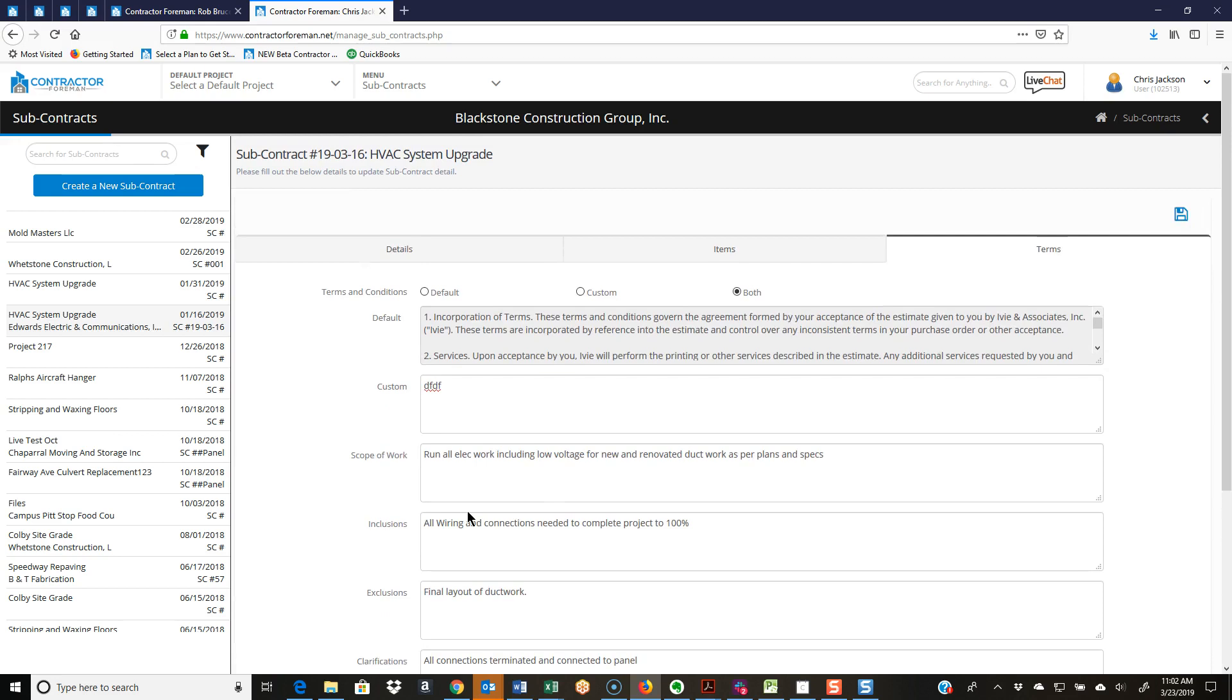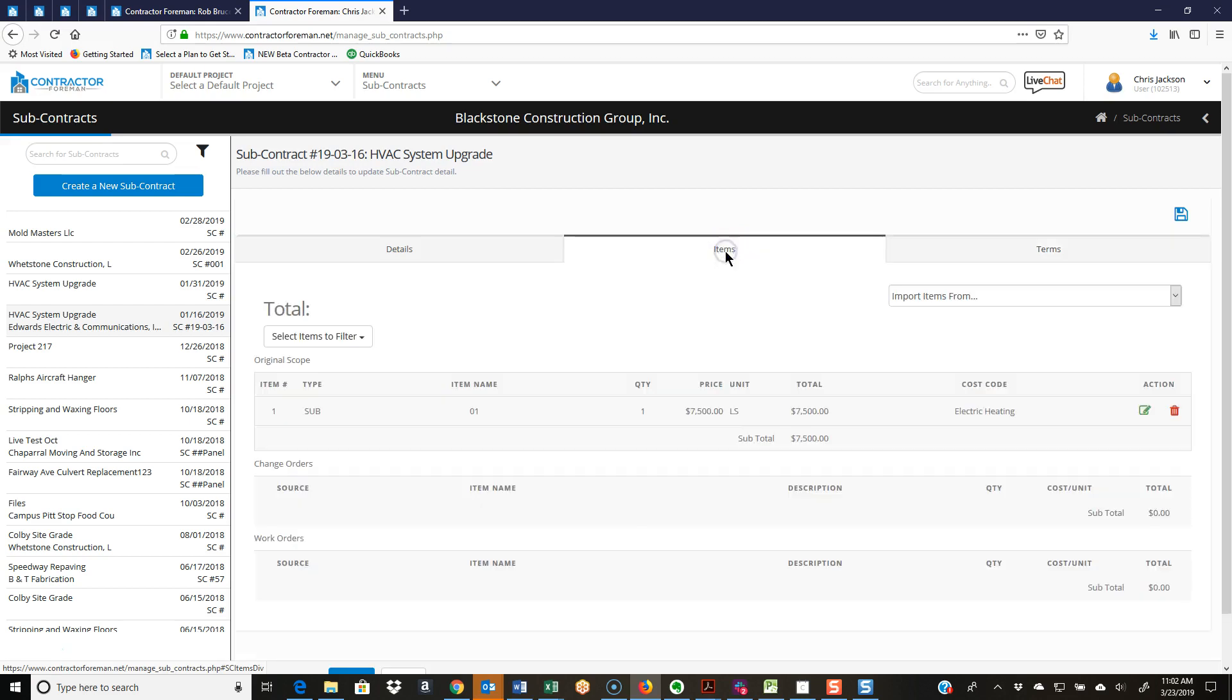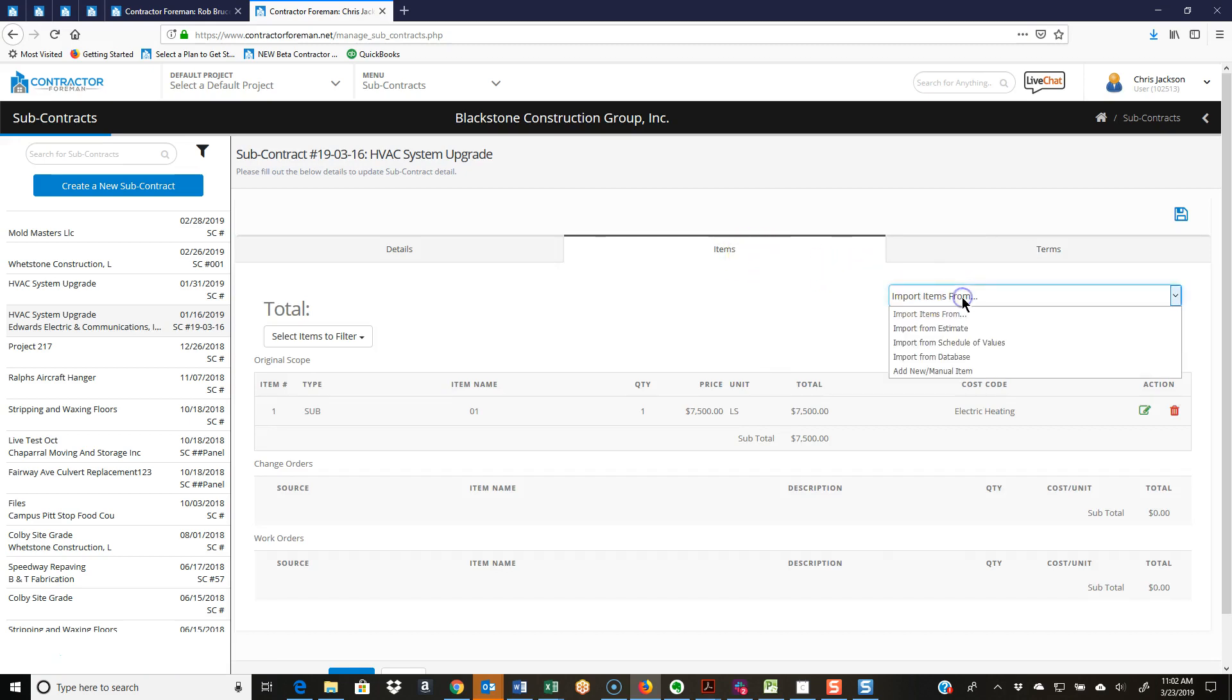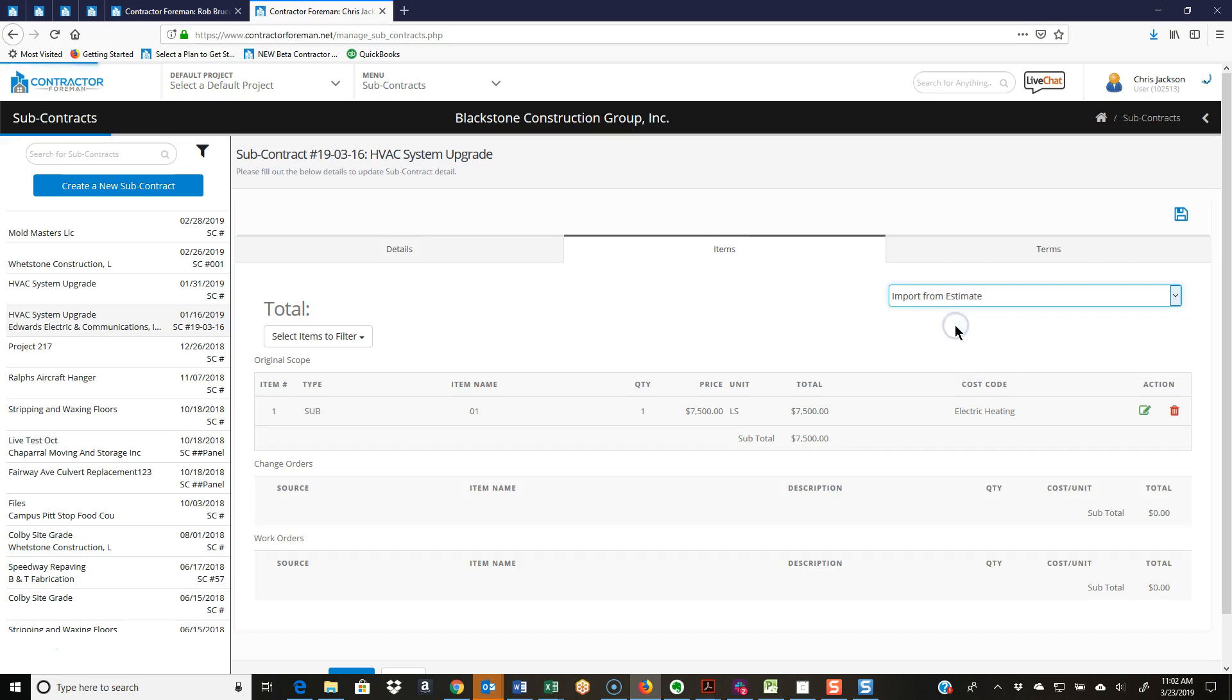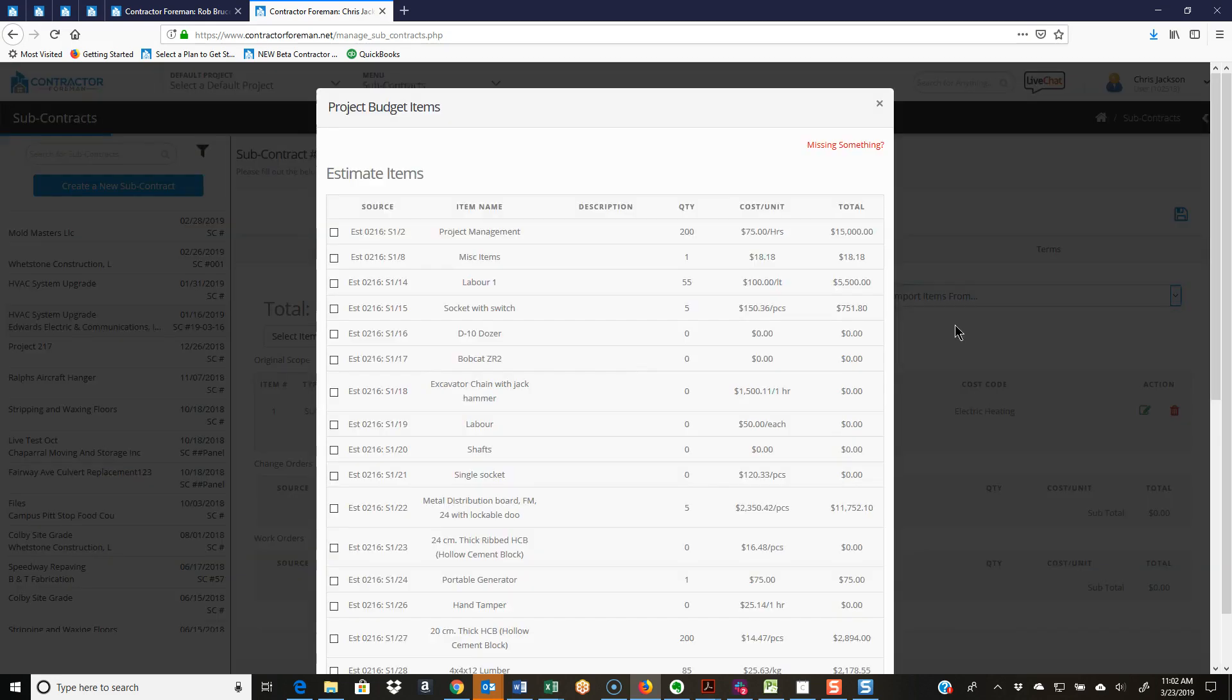Let me jump into the items now. So here's what's going to be included in that subcontract. When we go to add these items, a couple of things we can do. I probably in my estimate made a line item for this electrical work, for running wiring, for the ductwork. So import from estimate - don't have to type anything, it's just going to pull that right in. I just click that, brings me up a box of my items, I would grab the item that I want and bring it in.